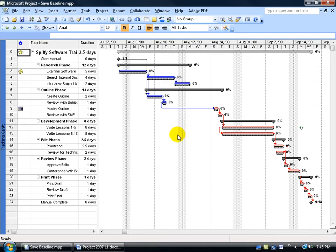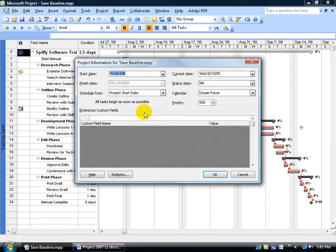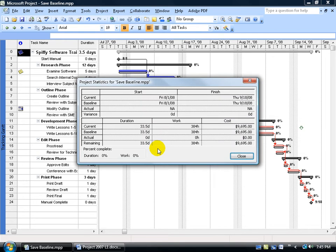Another place you can view the baseline is your project stats. Come up here and click on the Project menu, go down to Project Information, and then click on the Statistics button, and there's your baseline for your start and finish dates for the project, and then for the duration, the work, and the cost.